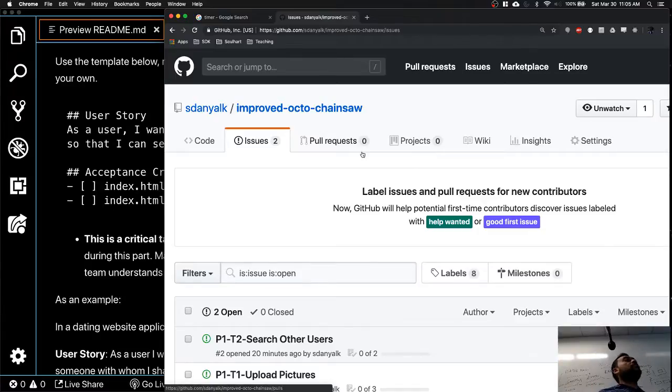That's it. If I'm not able to accomplish this, I'm going to come to my team and discuss, hey, I researched and we are running into these issues. At this point, you have the advantage to decide, do we shift, do we continue for the next 2 days? Or at this point, we want to call it quits and we don't have time to research more. Let's find a better music API that's easier to use.